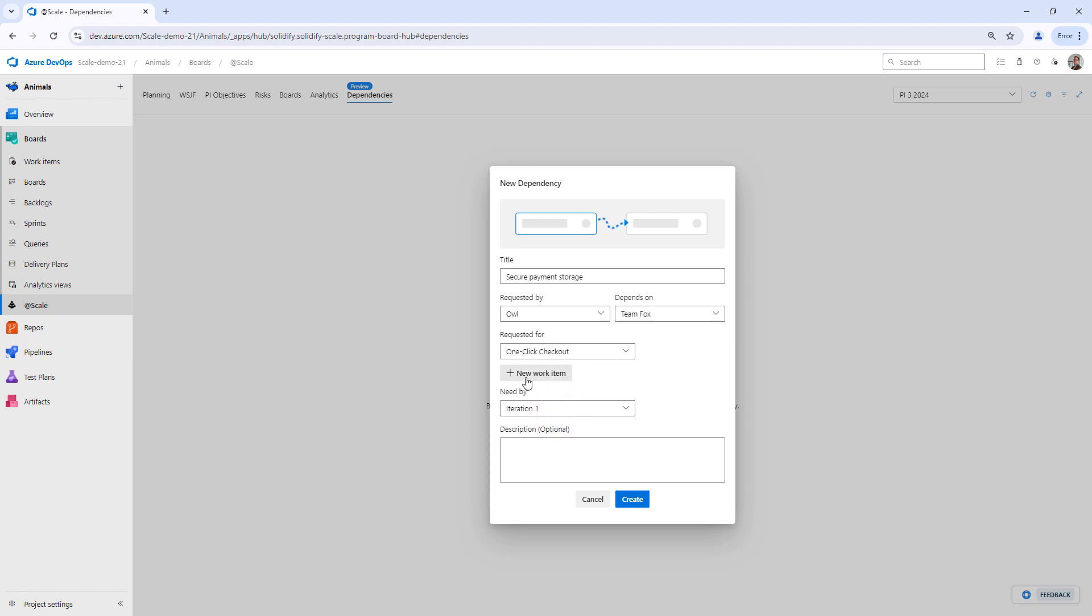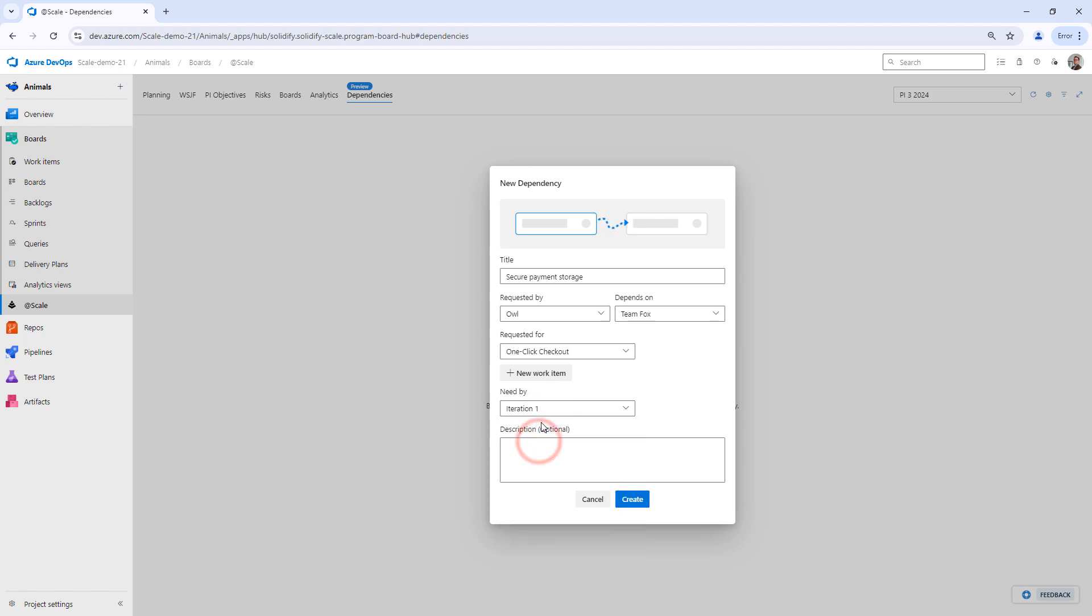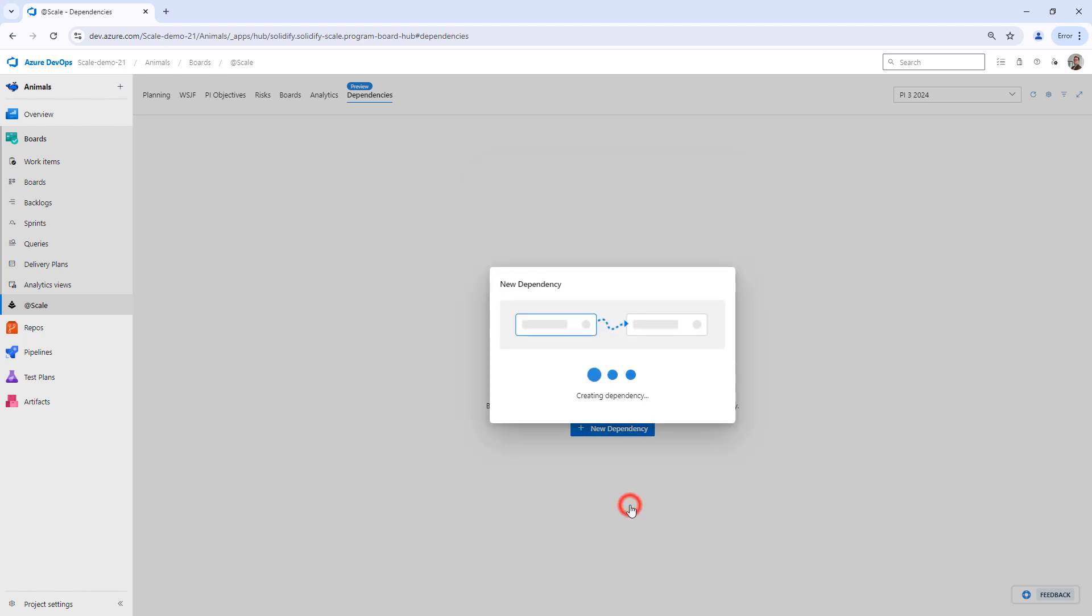So I can click a new item here or I can select one from the backlog. I can also let Team Fox know when I need this by, so I can choose an iteration. In this case, I'm going to say that I need it by iteration one. I can fill in more details here if I'd like to or I could leave as is. So for the purpose of this video, I'm just going to leave as is. So I click create.